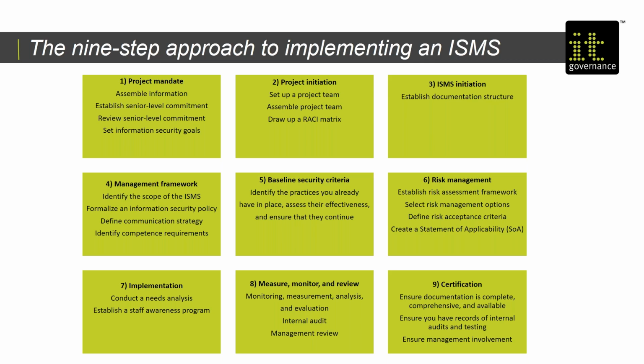Having got a project mandate, initiate the project. That means setting up a project team. Typically, you're going to assemble a project team from across the business. So you'd be looking to draw in people from most of the departments. You're going to look to draw people from different levels inside the organization, a few senior managers, a few middle managers, a few juniors, because you want to get the best mix of people inside the organization so they can have the most immediate hands-on input into decisions the project team's going to make.